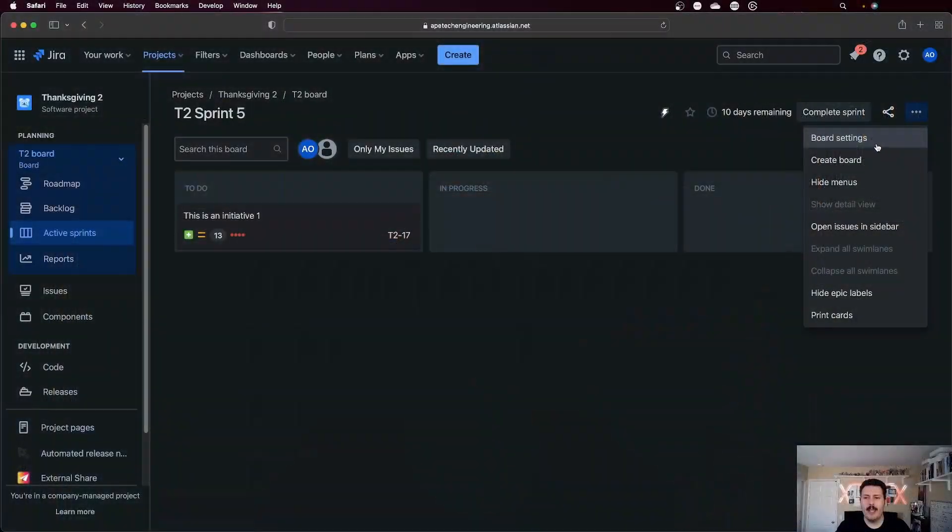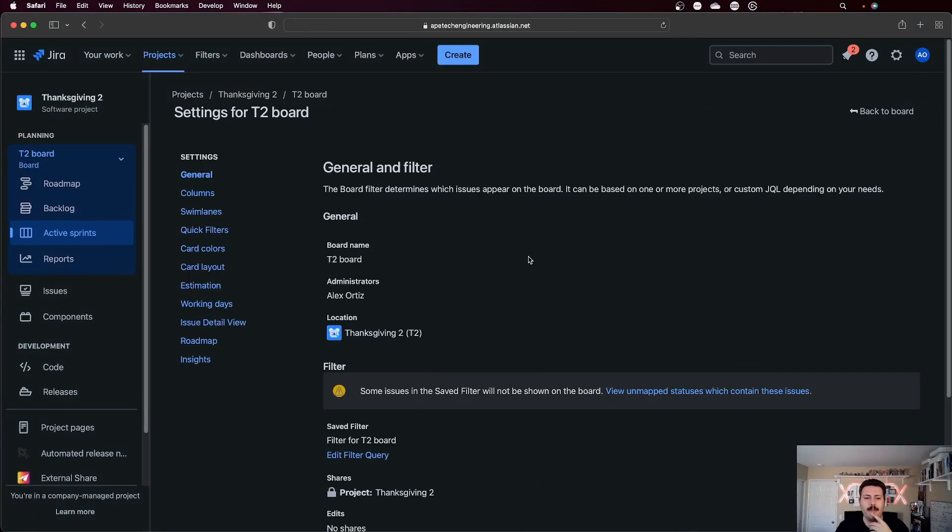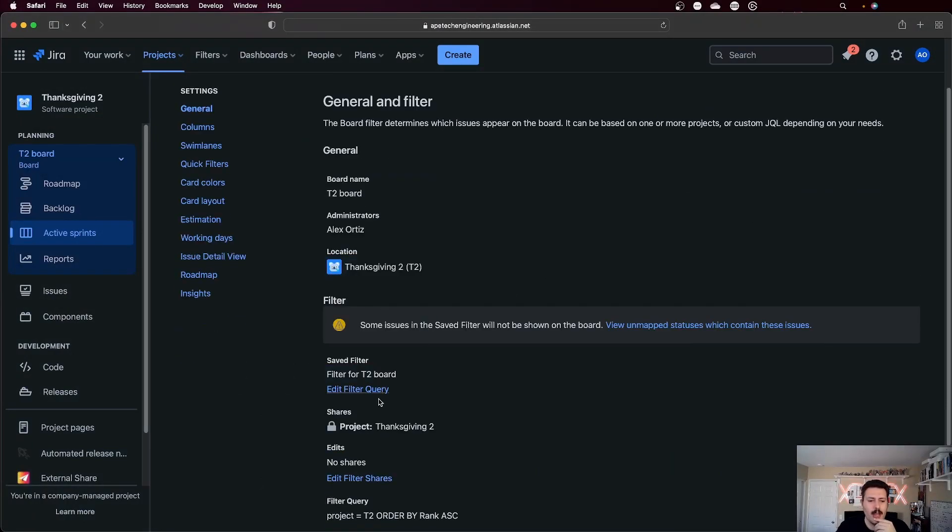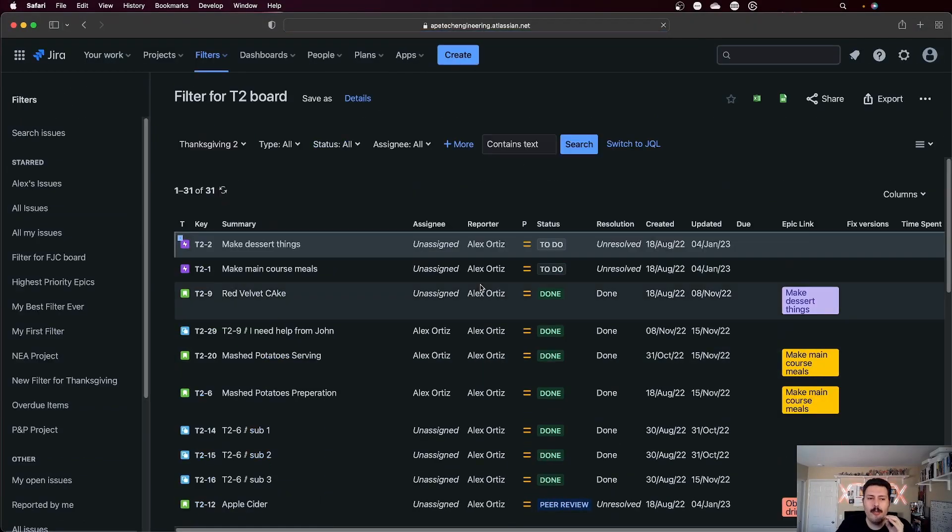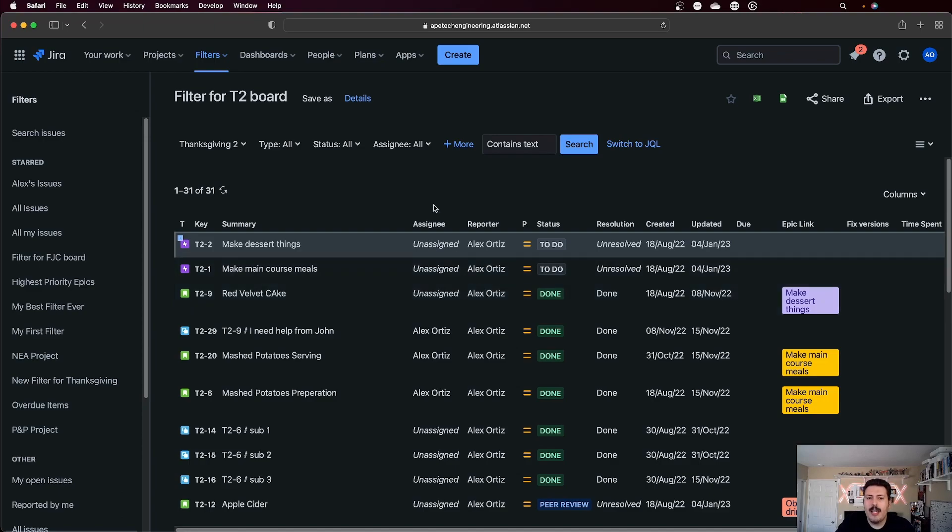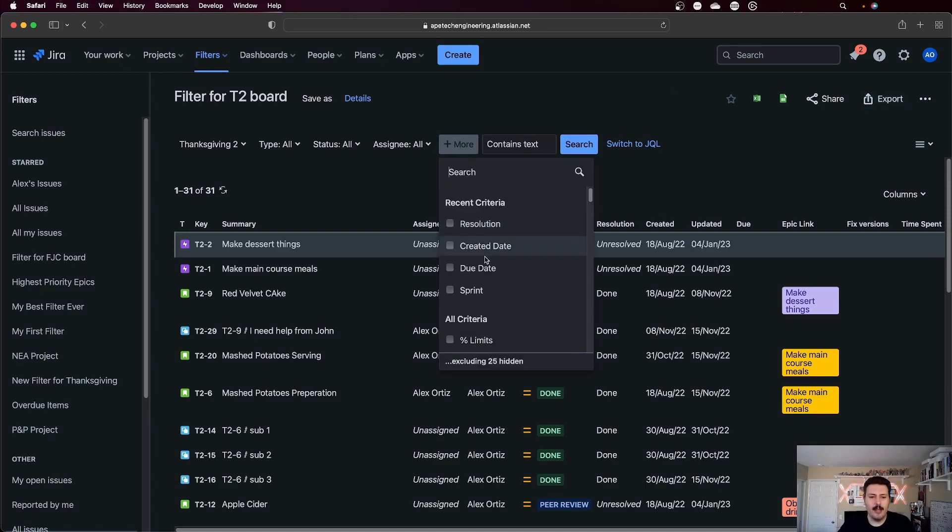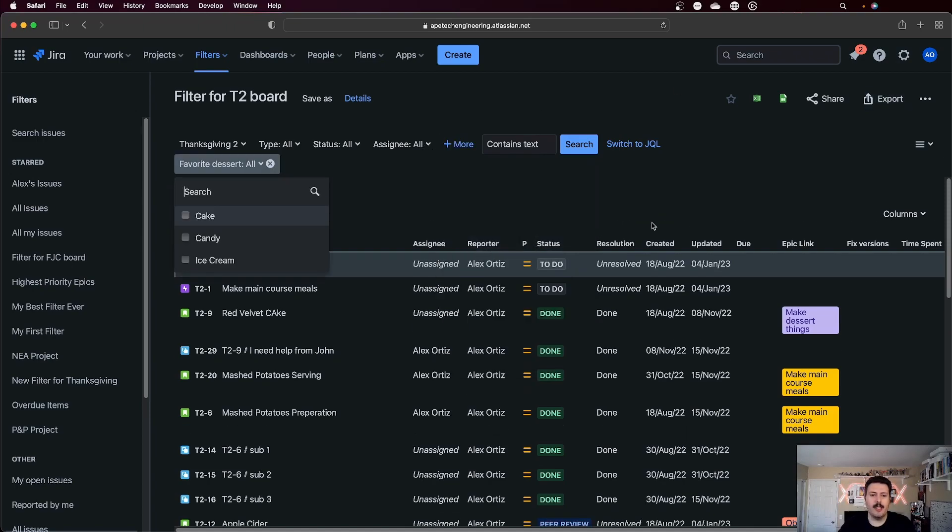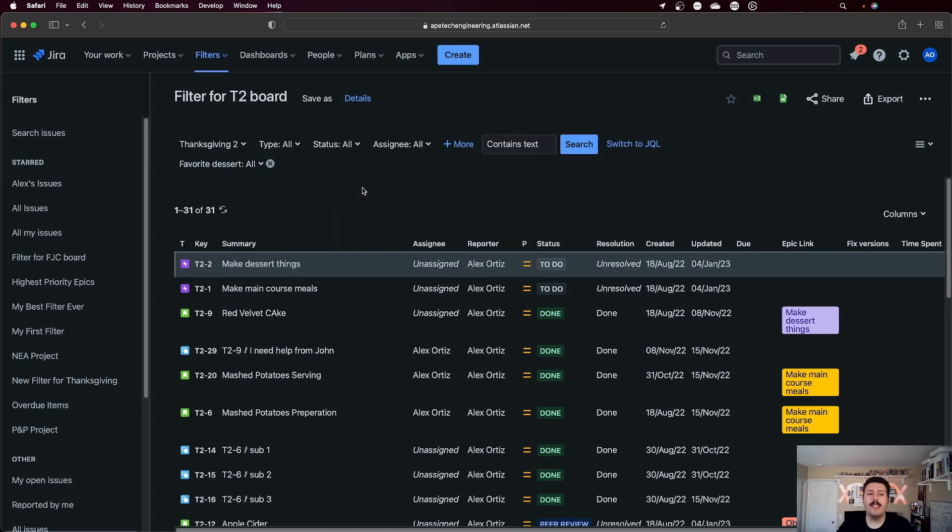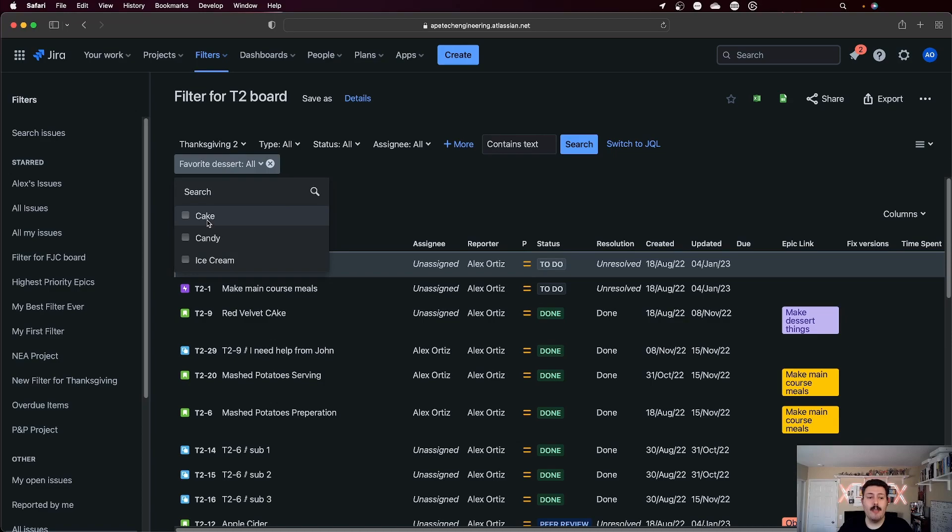In the filter criteria, when you're creating your filter criteria here and you come to edit filter query, you want to use a field. And I recommend you create a custom field, specifically a single select custom field. Because as long as you use a single select custom field that can only have one value, then that issue is going to be piped based on that criteria. So for example, I can have a custom field here of favorite dessert. And this is a single select. And so if I want to rename or make my board filter instead of all just to be the cake board,